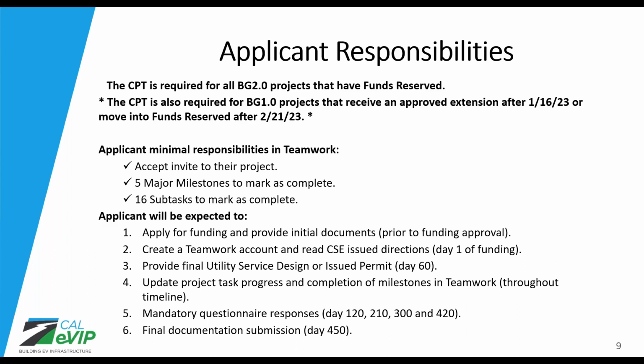So here are the expectations from applicants who get funds reserved within Block Grant 2.0 and for applicants who get funds reserved in Block Grant 1.0 after the 21st. The CPT is required for all Block Grant 2 projects that have funds reserved. Additionally, it's required for Block Grant 1 projects that have an approved extension that was approved after January 16th of this year, or Block Grant 1 projects that received funds reserved after February 21st, which is next Monday.